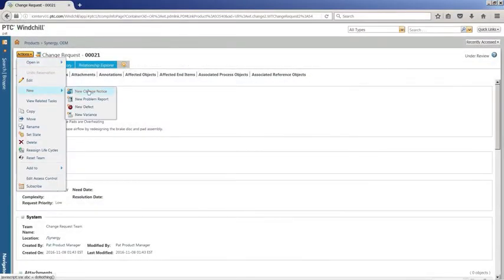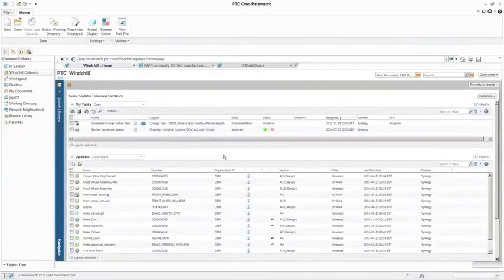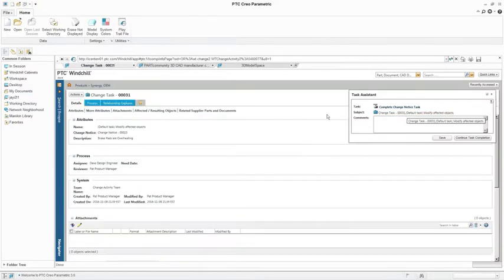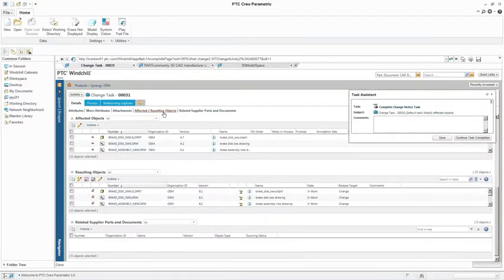where, once approved, a change notice can be created directly from it. The change notice might include tasks for making changes to the process plan, documentation, or CAD model.